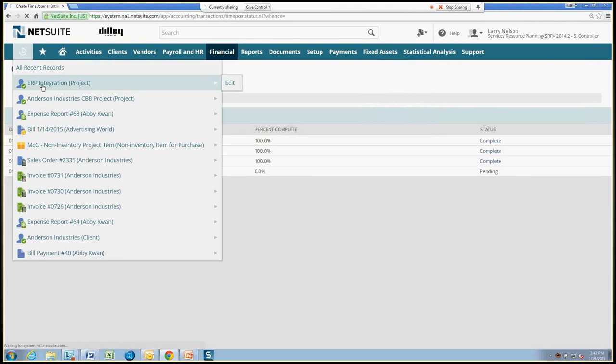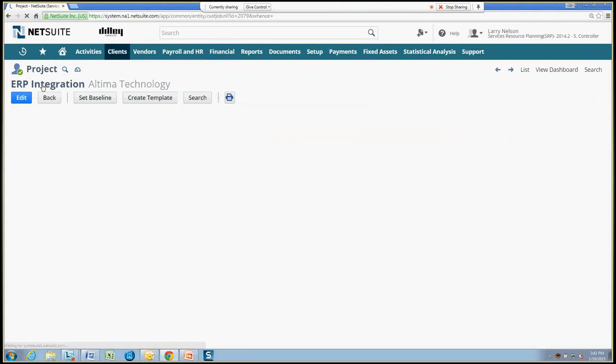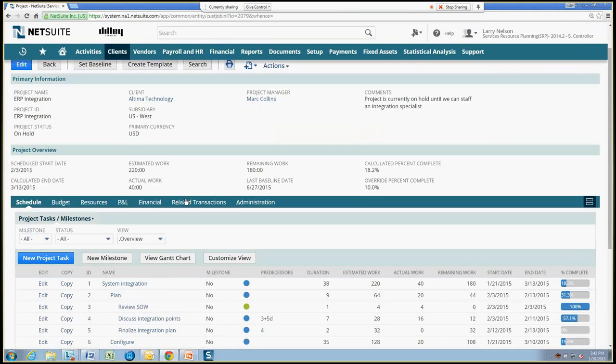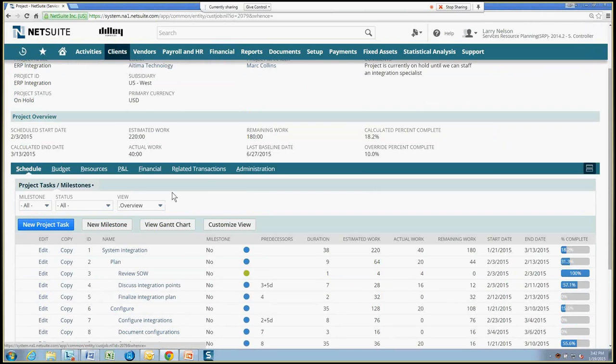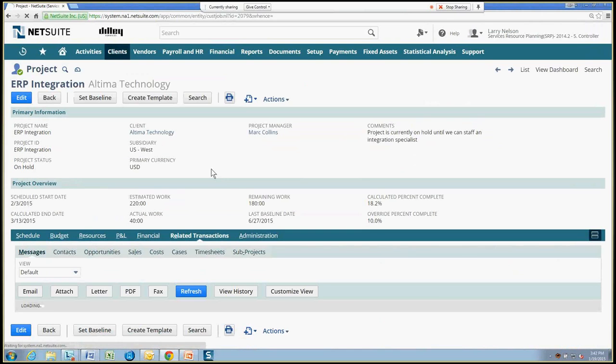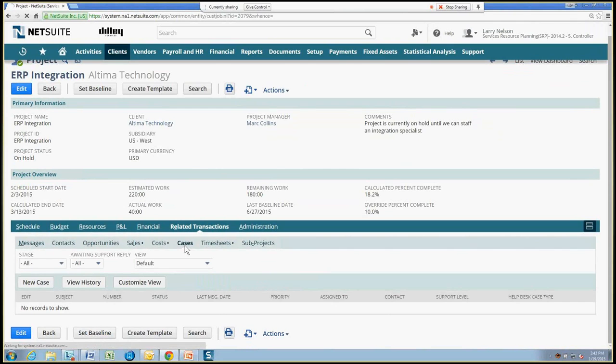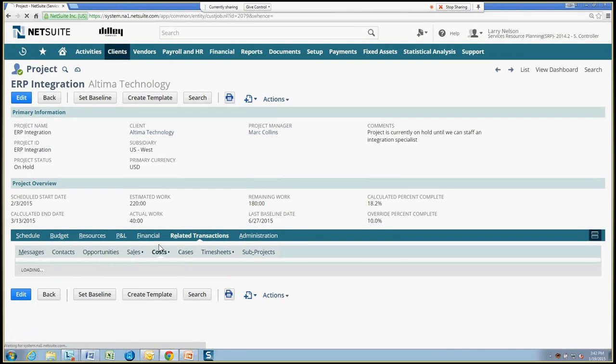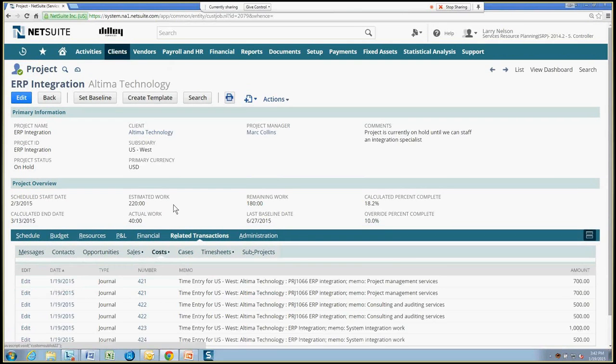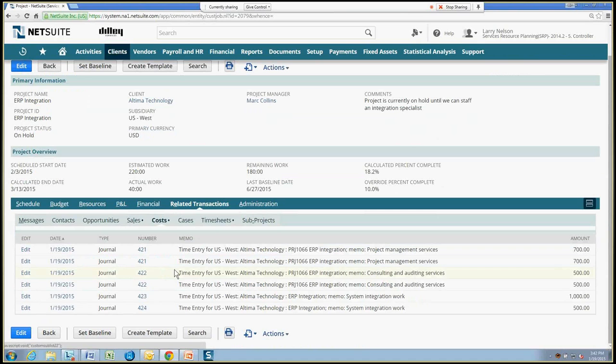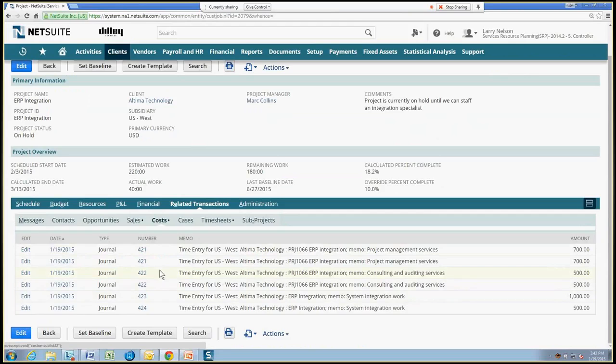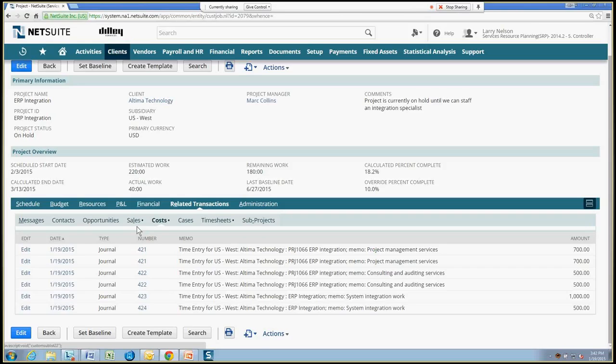And as time is posted, we go to our related transactions tab on the project and see all of those costs, including time costs. So this might be expenses in addition to time. In this case, we have journal entries from posting time for our ERP integration project, and that shows up there. Any revenues against the project, any time billed to the customer would show up on your sales. And the billing of that time would be based on the billing frequency and the billing schedule that's tied to this project.